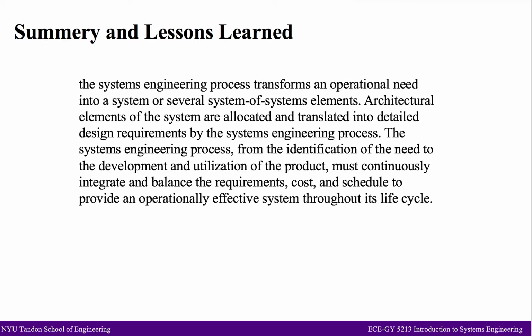Incorrect oversight, in fact, postponed the critical evaluation and the decisions needed to replan the program's faltering elements and contain the cost and the schedule overruns.